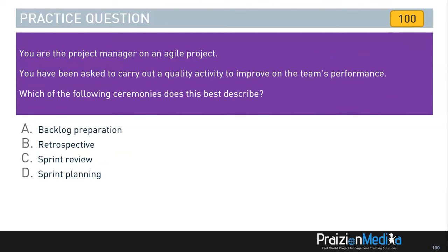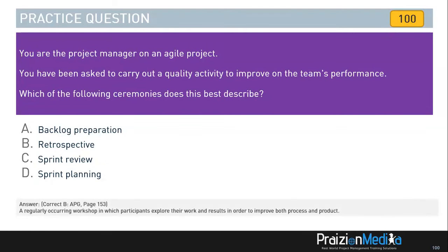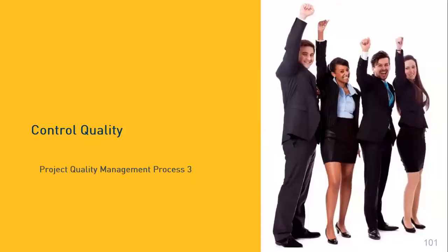Since this directly talks about team performance, there's only one answer that I would expect you to go for, and that is the retrospective. It's a regularly occurring workshop in which participants explore their work and results in order to improve both process and product.